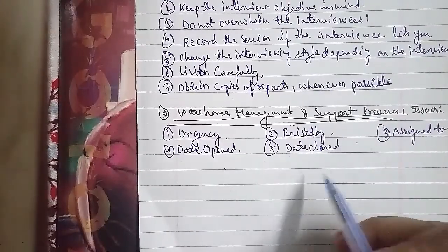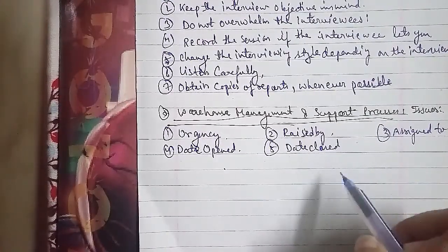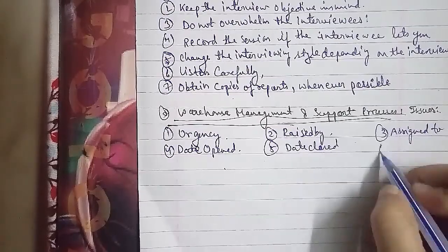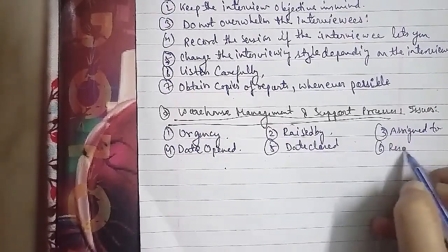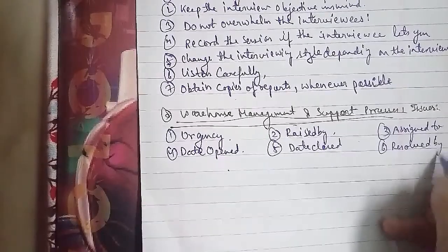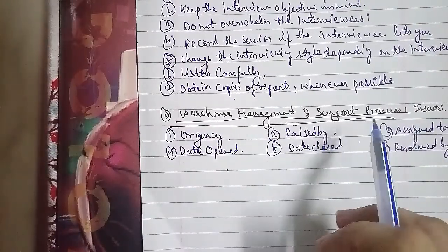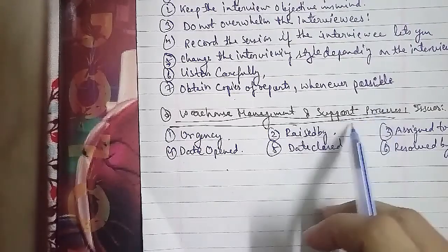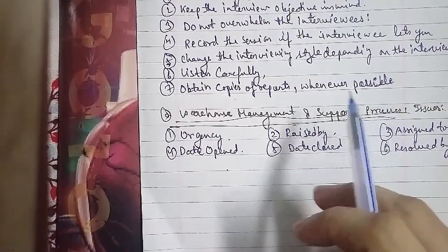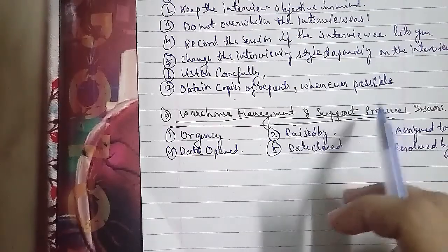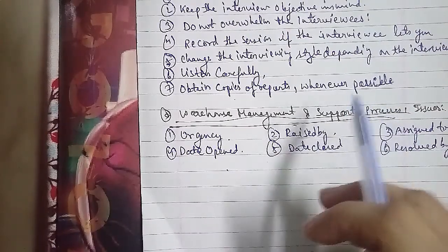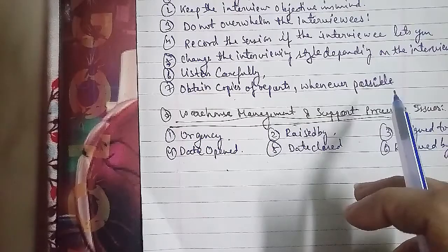In resolved by, the person who resolves the issue must have the required authority within the organization. User representatives typically resolve business issues, the CIO or a designated representative typically resolves technical issues, and the project sponsors typically resolve issues related to the project scope. Now we'll go ahead to discuss the resolution description.